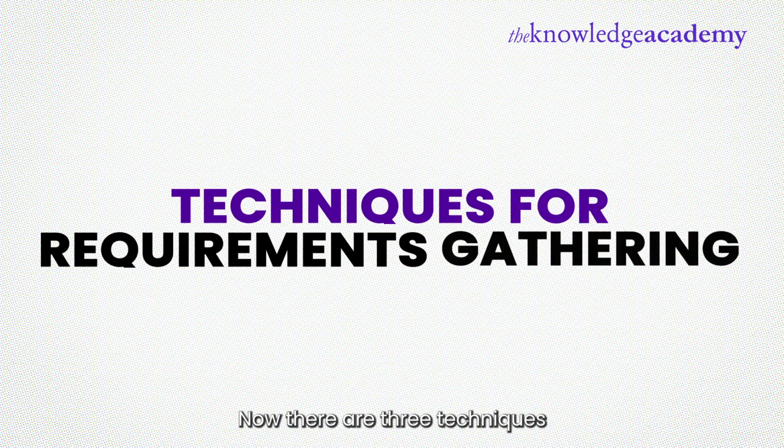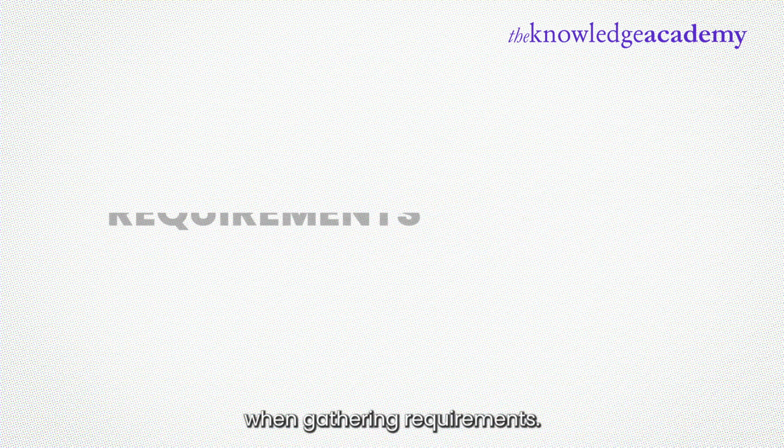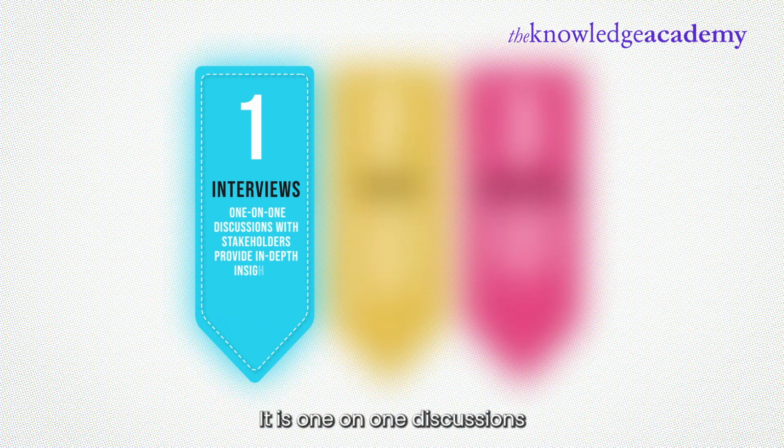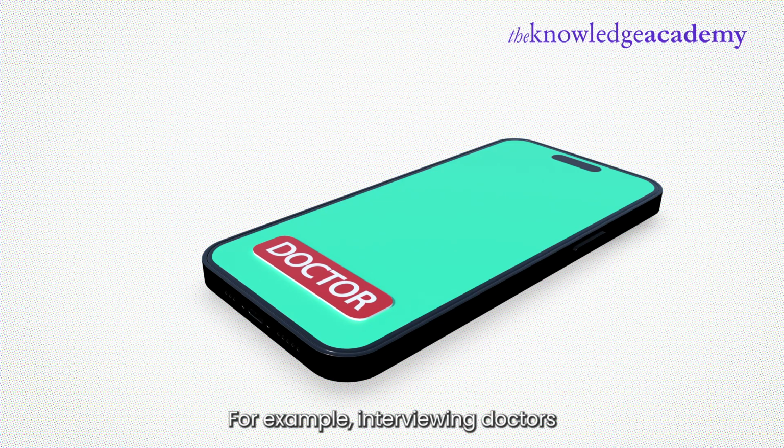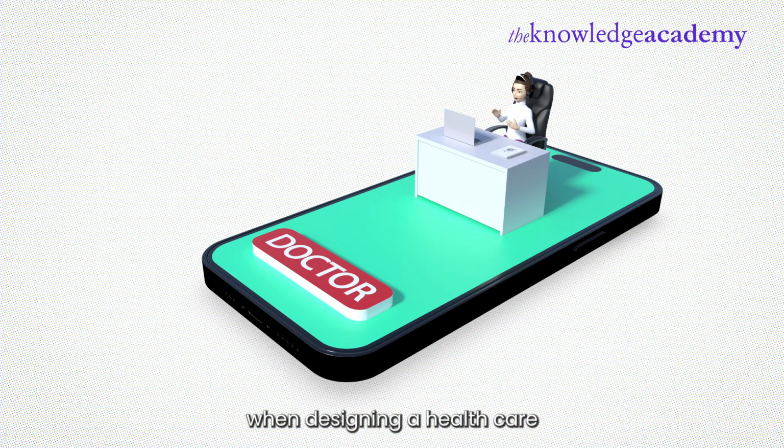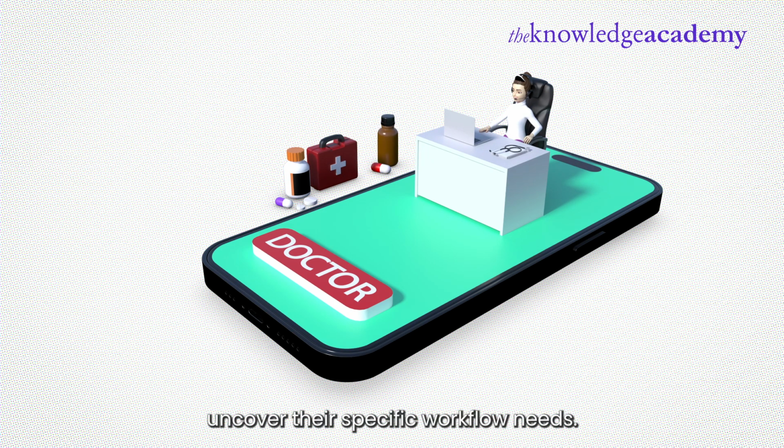Now, there are 3 techniques that stand out when gathering requirements. First, interviews. One-on-one discussions with stakeholders provide in-depth insights. For example, interviewing doctors when designing a healthcare app helps uncover their specific workflow needs. This approach is great for understanding complex challenges and clarifying unclear requirements.